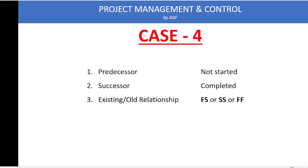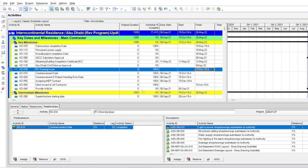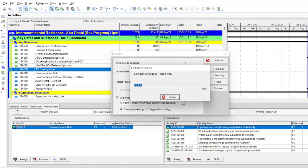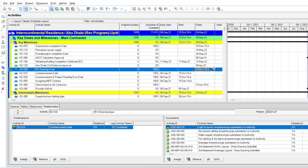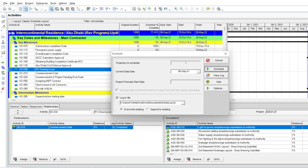Now we'll see this in Primavera itself. This is one of my populated programs. Before checking the program, recall from my previous video that the easiest way to check out-of-sequence activities is to check the log. Before checking the log of any updated program, I recommend you run the program first. Press F9, then press Schedule.